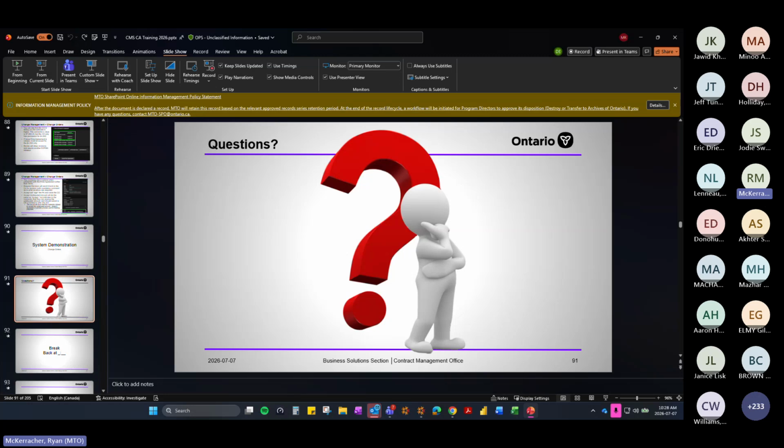If it's already been paid in an invoice, it's already locked in. It's gone and out the door, so it can't be reversed or adjusted. You can only add new quantity on top of it, but once it's paid, you can't reduce it from the contract because it's already been paid. How to create a new subcode, we just covered that.